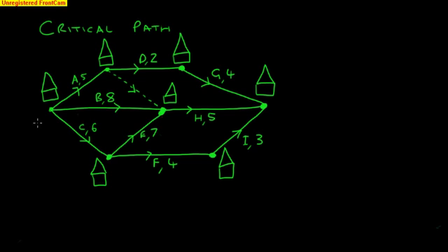Okay, here we go. We will start off at the beginning. We have a 0 at the beginning. Now, to get a critical path, we want the maximum times as we go along here to get the earliest start time. So the maximums, we have 0 plus 5 is 5, will get us down activity A, or a 6 will get us down activity C. Then, activity B goes straight to this middle point here. That would take 8. Or we could get there going via activity A, that's just 5 and there's no time for that, so 8